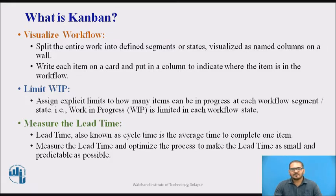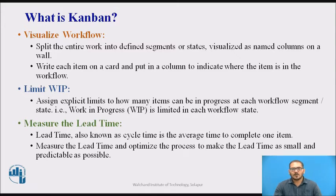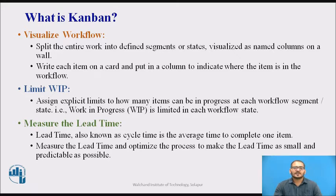Measure the lead time. Lead time, also known as cycle time, is the average time to complete one item. Measure the lead time and optimize the process to make the lead time as small and predictable as possible. This concept of Kanban is a direct implementation of a lean pull scheduling system, where an item can move to the next segment or state only when it obtains a slot there.